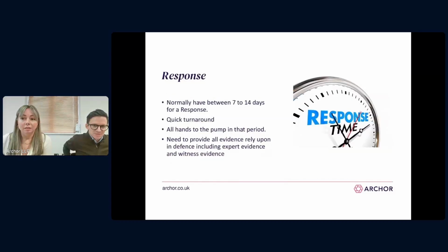The next submission is the response, and as the slide says, you often get, say, between 7 to 14 days, depending on the type of dispute. If it's a relatively self-contained smash and grab, you might get 7 days. If it's something more complex, extension of time, loss and expense, something like that, you might get towards the end.